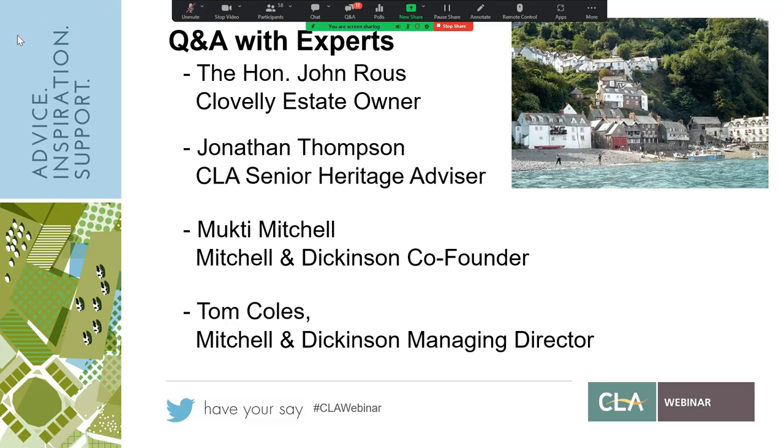And just briefly, we did, as you heard in the film, refer to the question of quick fix of high heat retention radiators, but rejected that on the grounds of costs of running them, which we felt were going to be exorbitant for our tenants, and unaffordable therefore. So whilst it would have solved the EPC question, it would not have solved our tenants' problem of heating their properties in an affordable way.